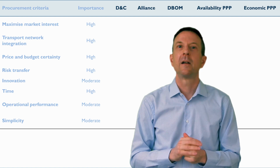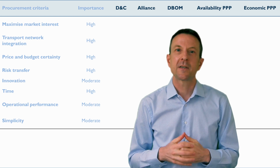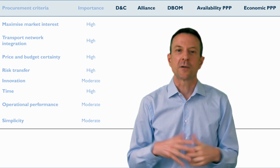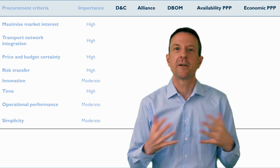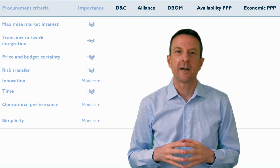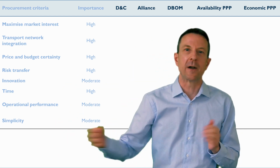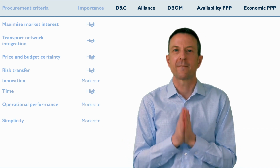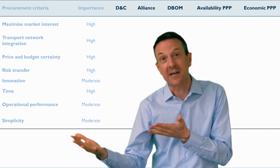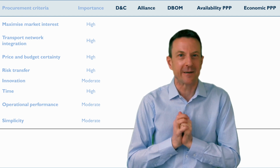The first of them, D and C, as we call it in Australia, design and construct. This is what in some other countries is called design build, DB, or sometimes EPC, engineering, procurement and construction. So this is where we ask a contractor to complete a design and build the project under the one contract, typically on a fixed price, fixed time basis, although the fixed time, fixed price aspect of that contract sometimes falls apart if the project gets into difficulty.